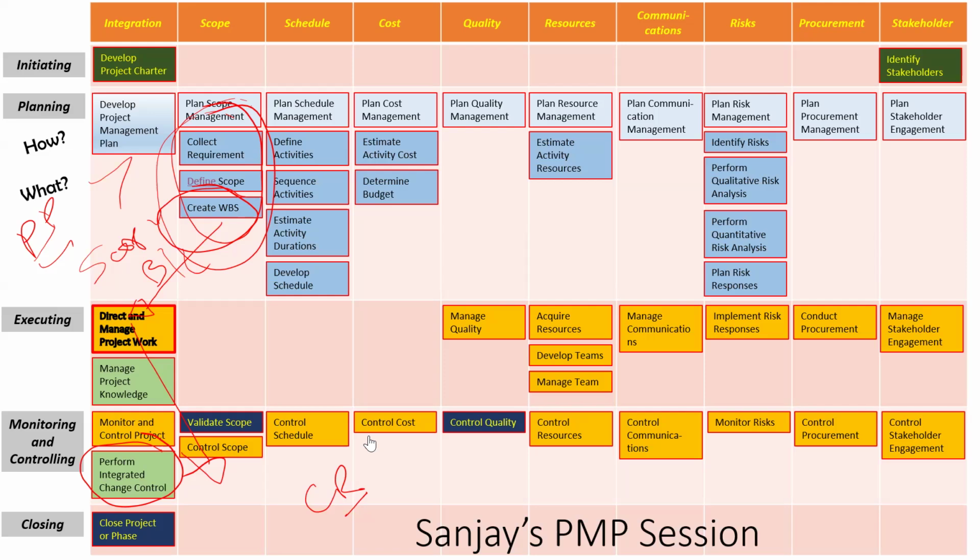Listen to this carefully and tell me about this. Shishir was very clear about the processes. He said that if a customer picks up a phone and calls you saying something new is required to be done, don't just accept it. Always divert him to me. Correct, Shishir? Yes, I will talk to him, some commercial things and all that. We will approve that. If that change is approved, then you start working on that. That is no more a scope creep. It's an approved, proper process change.